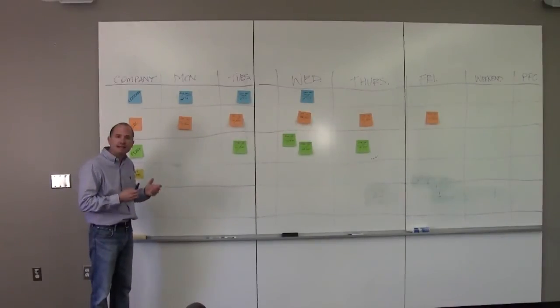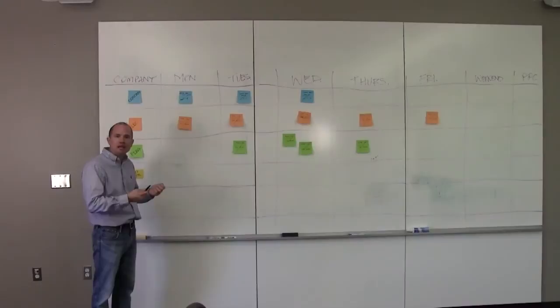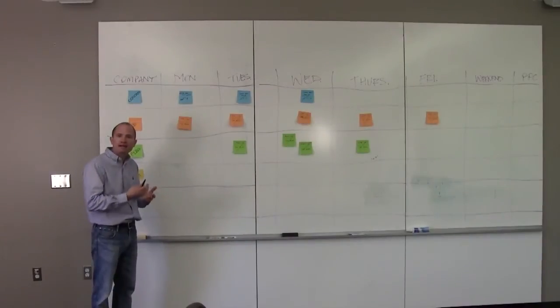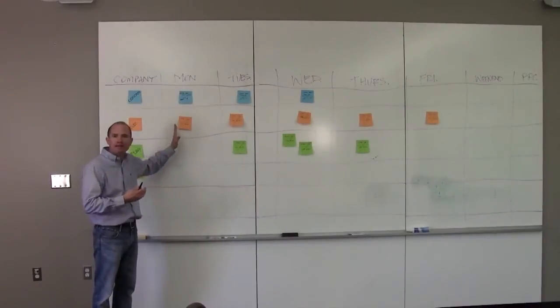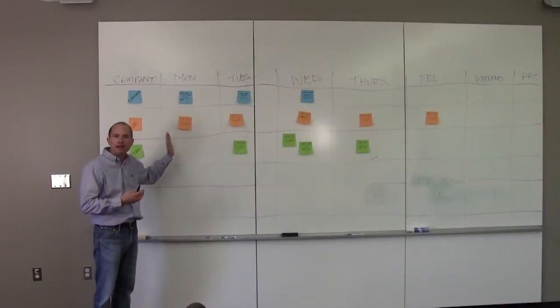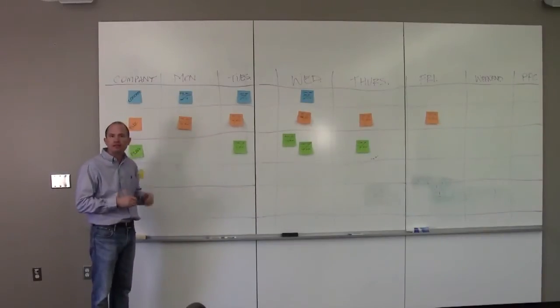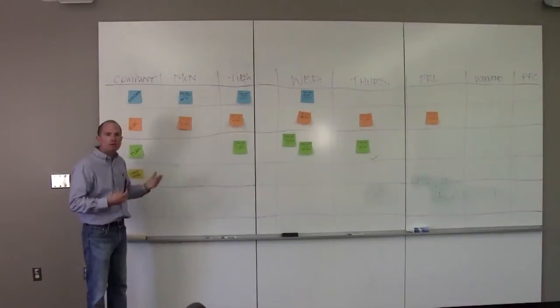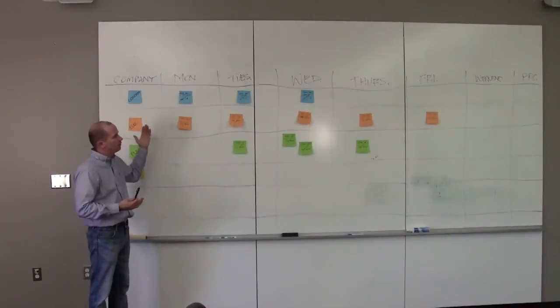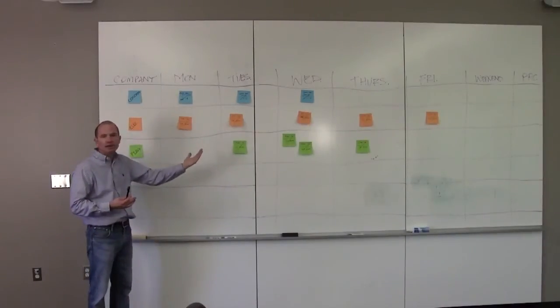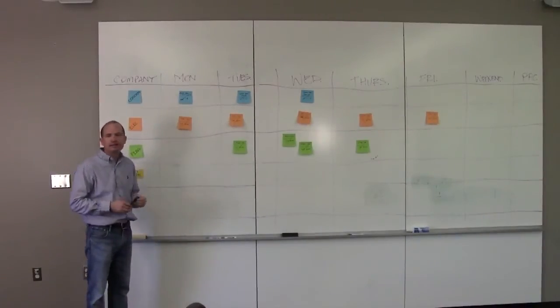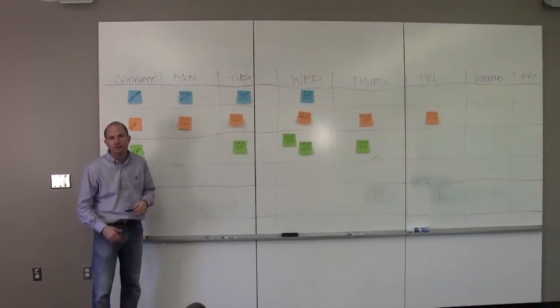The idea is when you do it daily, you have a quicker time to react and know that you're not meeting the schedule and recover, then a week later you find out that there are certain tasks that aren't done. So right now what we have is we've gone through the week and everybody thinks that they've done what they said they were going to do.